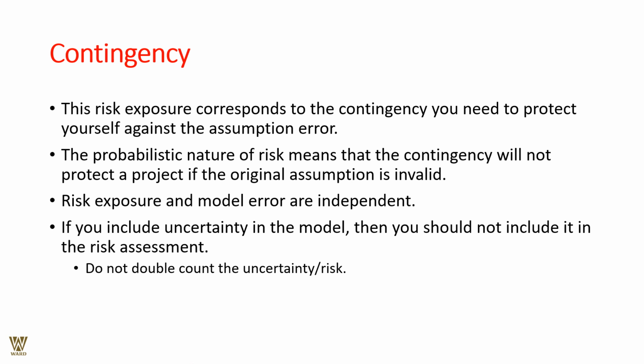The probabilistic nature of the risk means that the contingency will not protect a project if the original assumption is invalid. Risk exposure and model error are independent. If you include uncertainty in the model, then you should not include it in the risk assessment. Do not double count the uncertainty. Do not double count the risk.